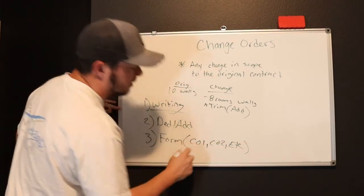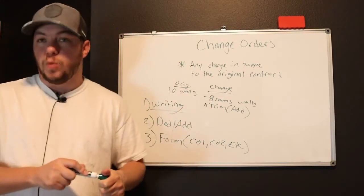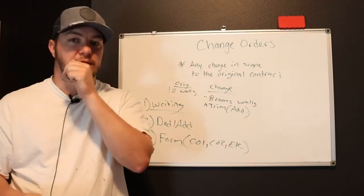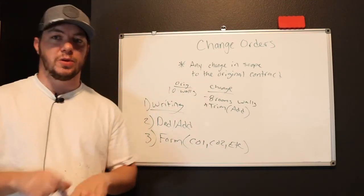So you name them like this because sometimes on the big jobs, you'll have 10, 15, 20 change orders. Hopefully not, that becomes a hassle. But you want to put them on that same proposal form. You just want to rename the form. Basically keep it looking the exact same, rename it to change order one, two, three.